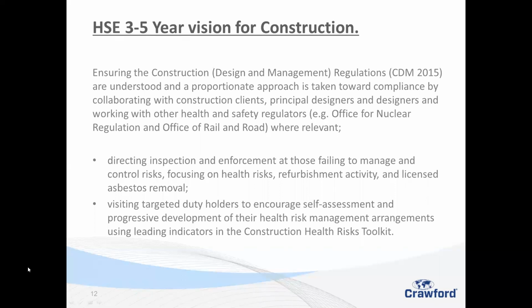So it's quite easy for me to see sometimes when one of our contractors has turned around and said, it's just a bit of painting and decorating. We're going to have our feet on the ground, so there's no working at height. The access and egress is great. The policyholder is going to go away for the week. So it's really simple stuff. And I'm quite happy that a proportionate approach on that is the way forward, which is let's have a low level CPP and let the people get on with it. And I think that covers the base there.